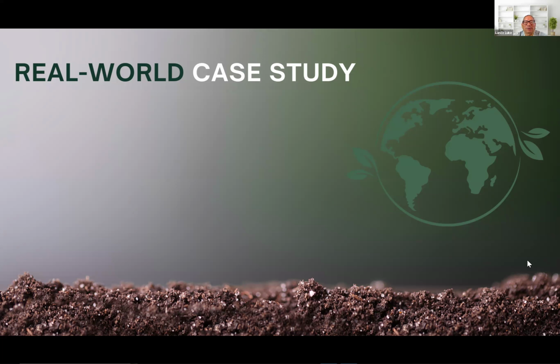I'm like, well, this contractor messed up by assuming that he didn't need a soil study. Even to protect his butt, he should have said, even if he was dumb, right? He should have told the owner, you know what? Although the old house was there, you gotta get a soil study.